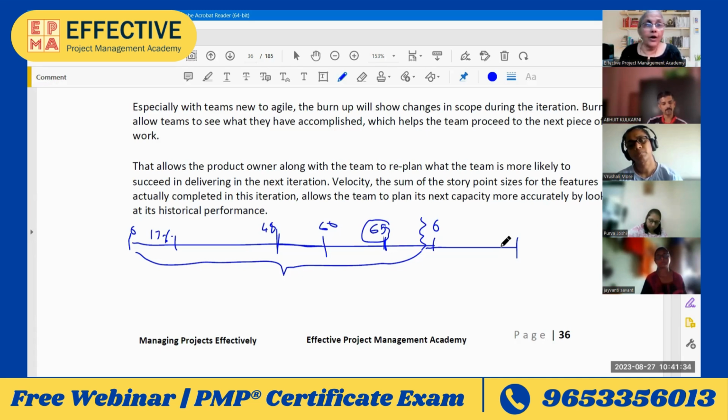And on top of it, all of us were involved in it. We did not get a good idea till almost the project was over. We were thinking that we are going on well because what we measured was total work. Let's say there were 100 reports. So 100 work is there. We have completed 48 reports, so 48%. What we perhaps failed to realize is whatever 52 reports are not completed, they are much more complex than what we have completed. How can we measure percentage in so simple forms?